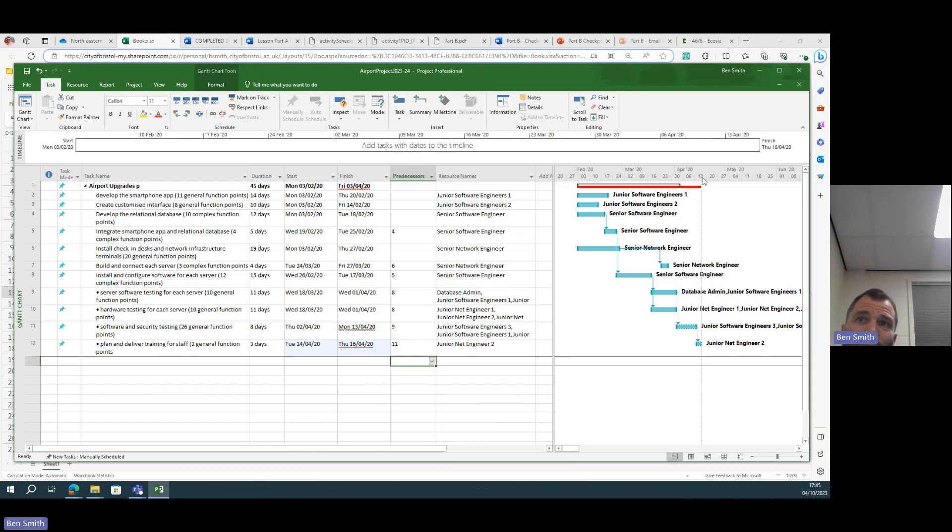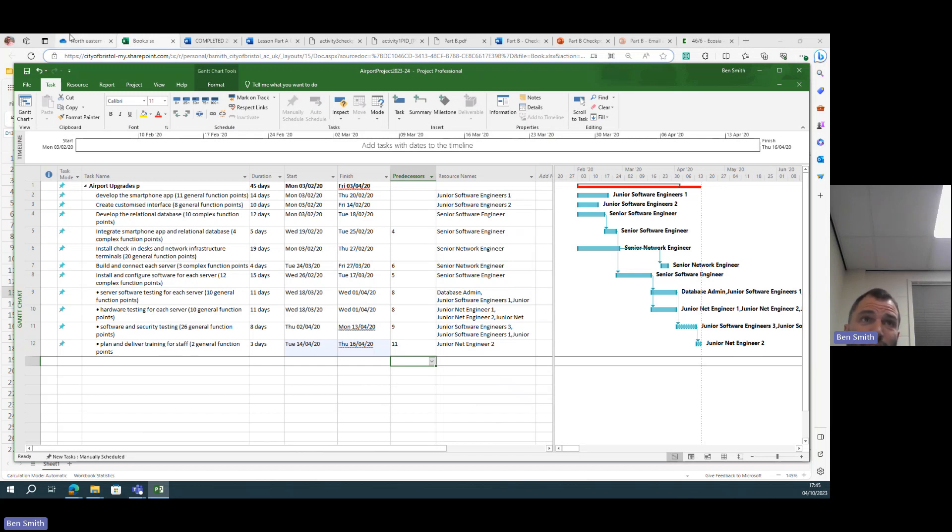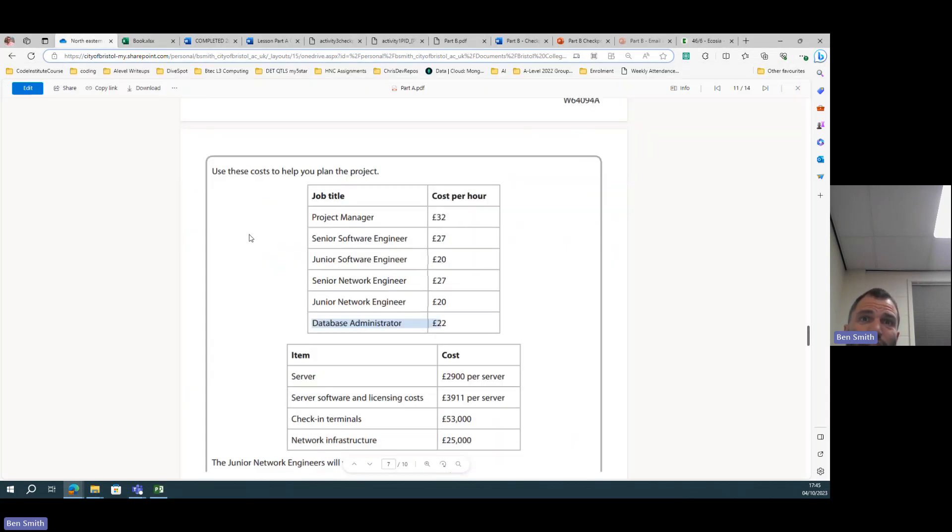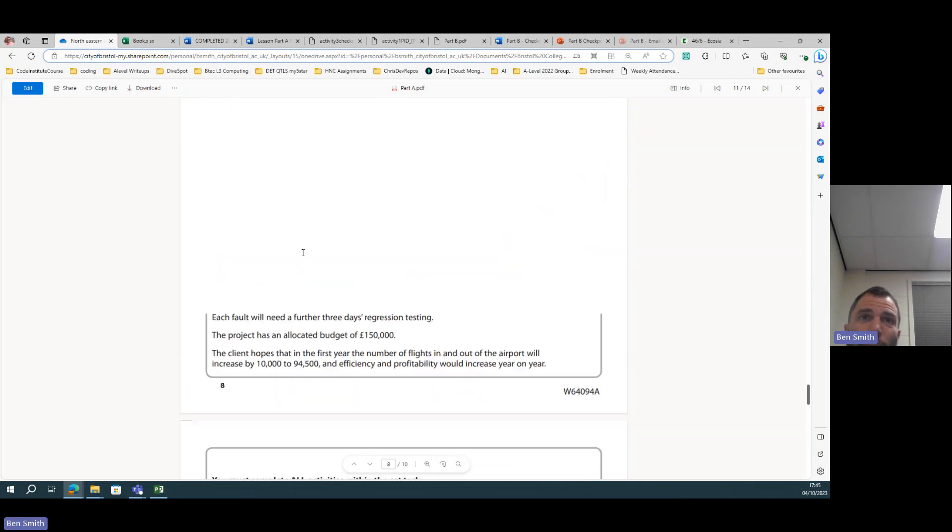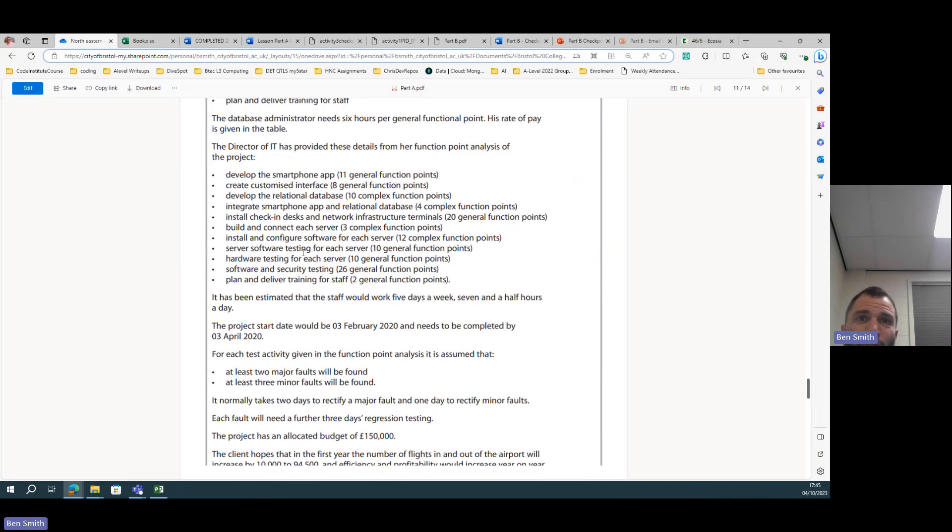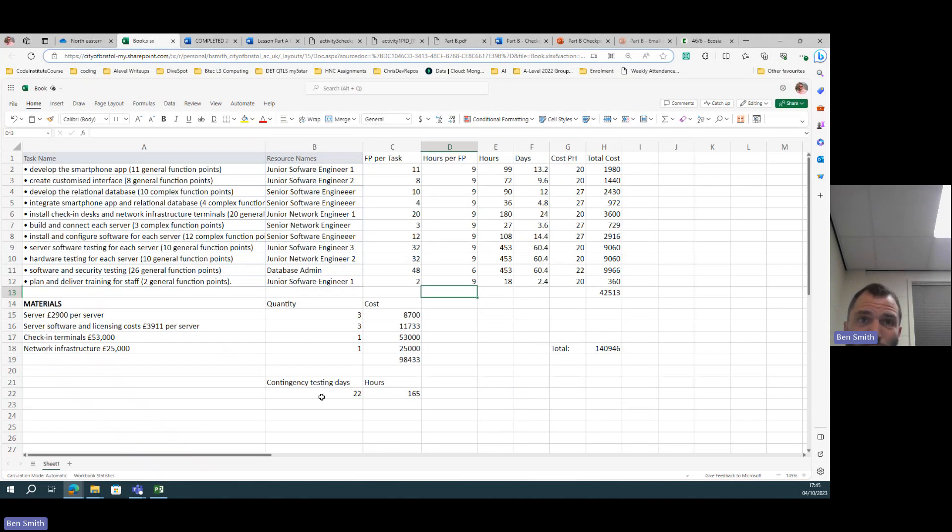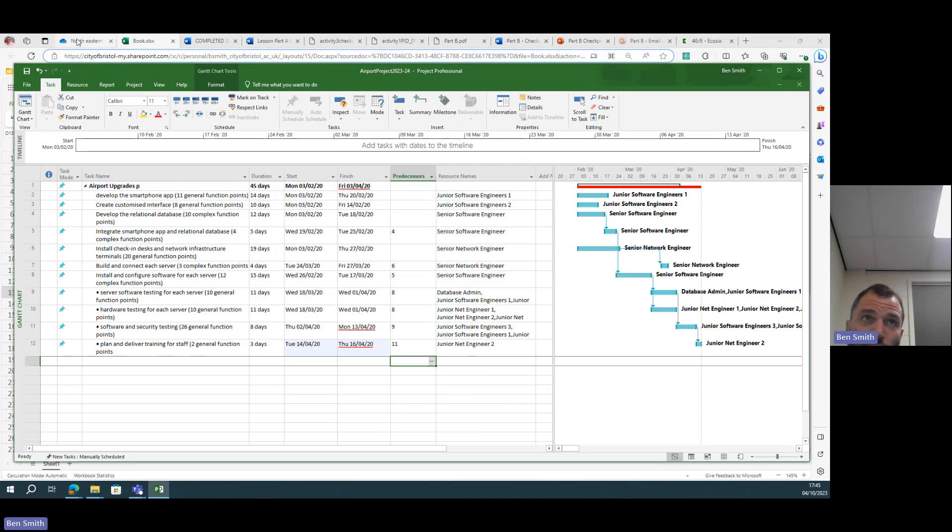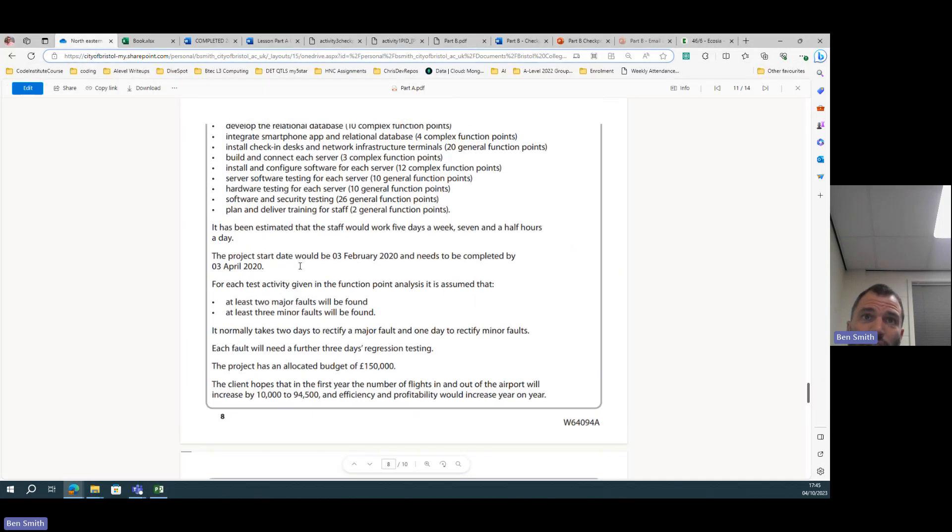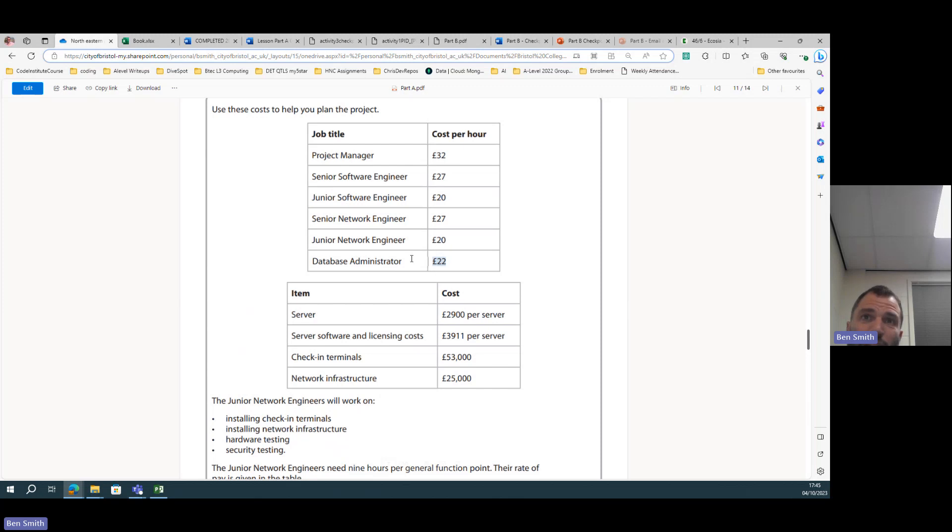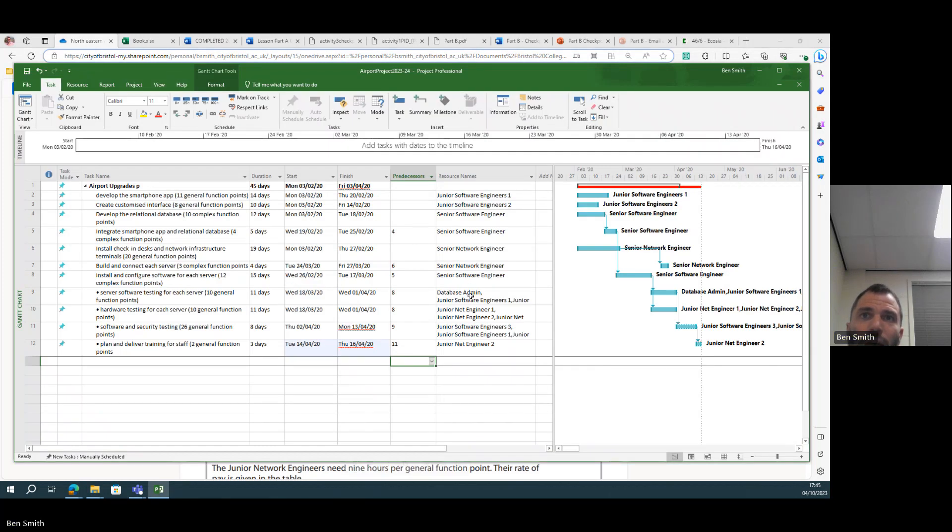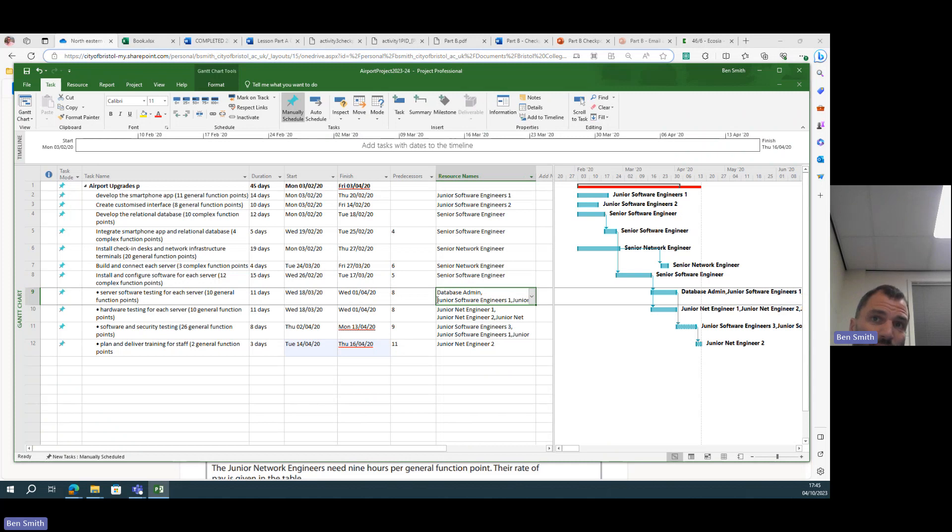But it wasn't like a massive like month or two months, so you might be able to argue that your project has slightly overrun, but only so that you can build in this extra testing time for major and minor fixing and testing on for major and minor faults. So you have a reason for it to run over, and I've successfully done that by using resources that have the same rate of pay. So I haven't got to go back in and calculate it—the junior network and junior software all on 20 an hour.